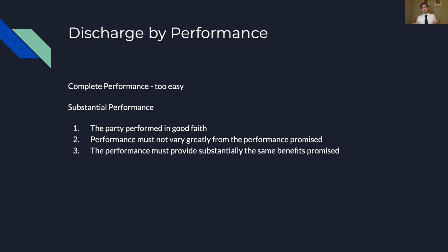Well, in that case, we're going to say that's probably substantial performance, and I'm still going to have to give you the $10. I can't throw up my hands and yell at you because this isn't the specific cookie that I wanted. When it was substantially, and you did your best, and it's the best that you could possibly procure for me under the circumstances, we're going to call that substantial performance, and you therefore performed, and I've got to pay you the $10 is what this all means.